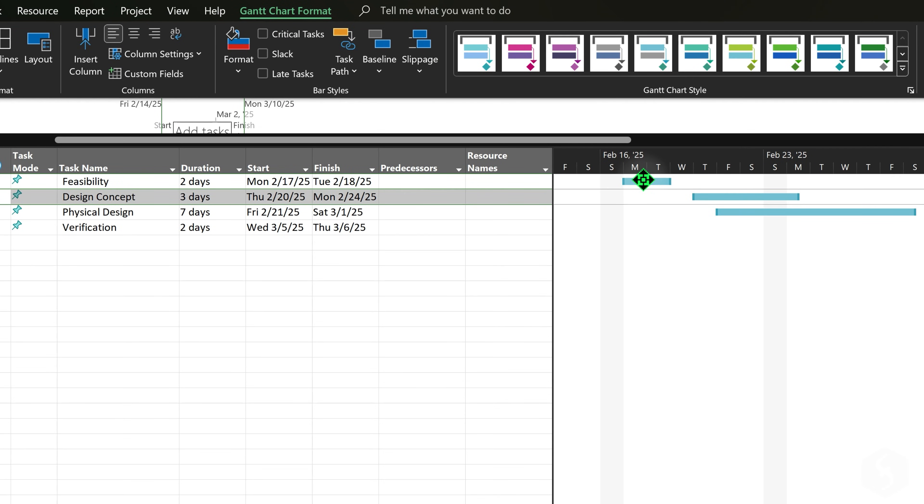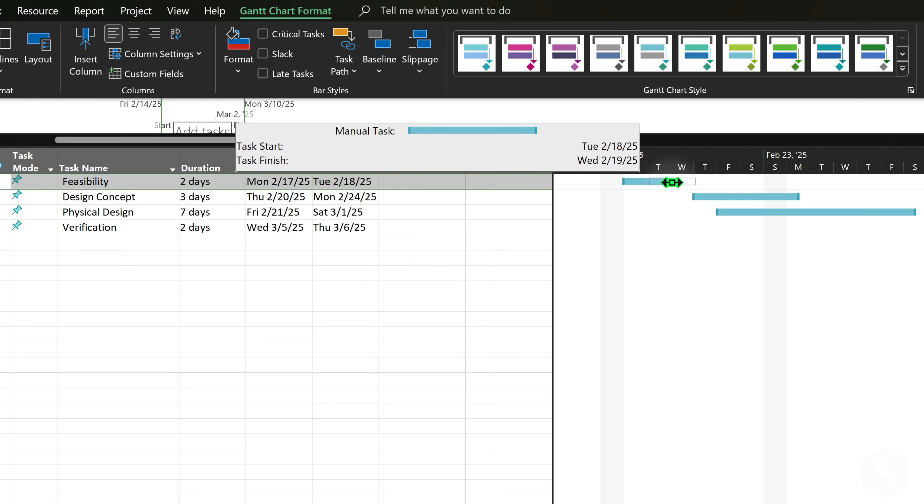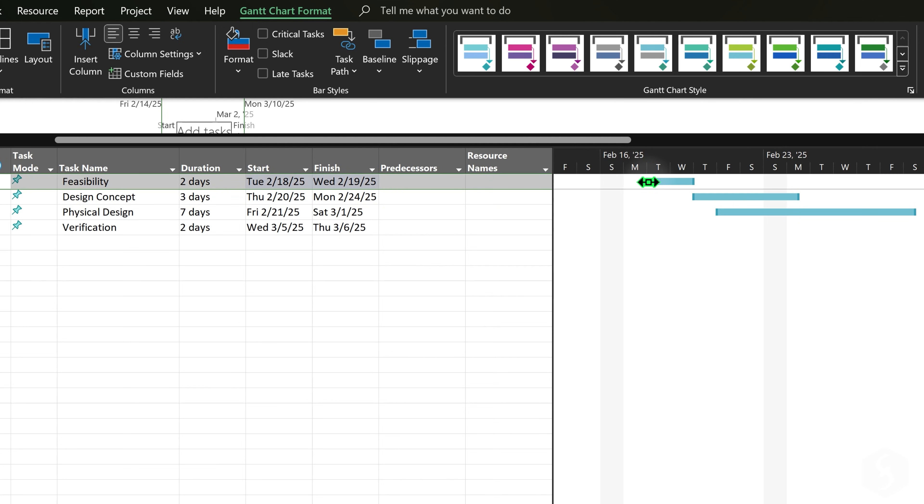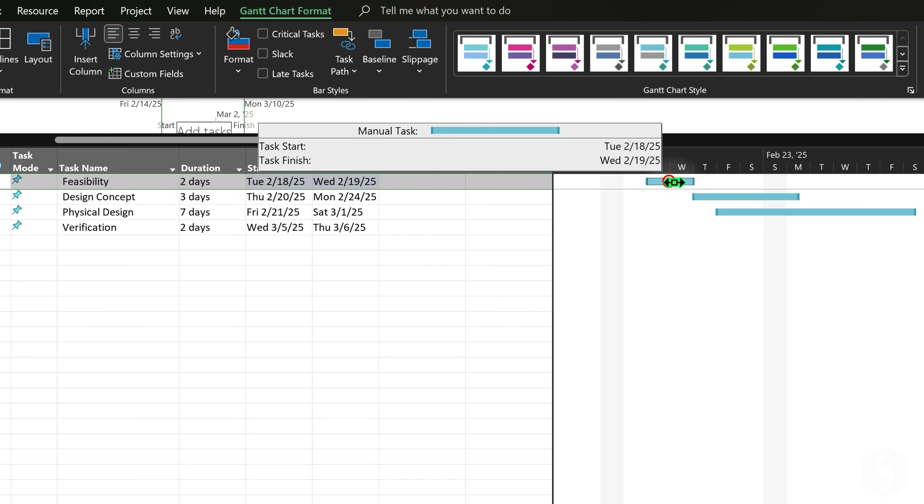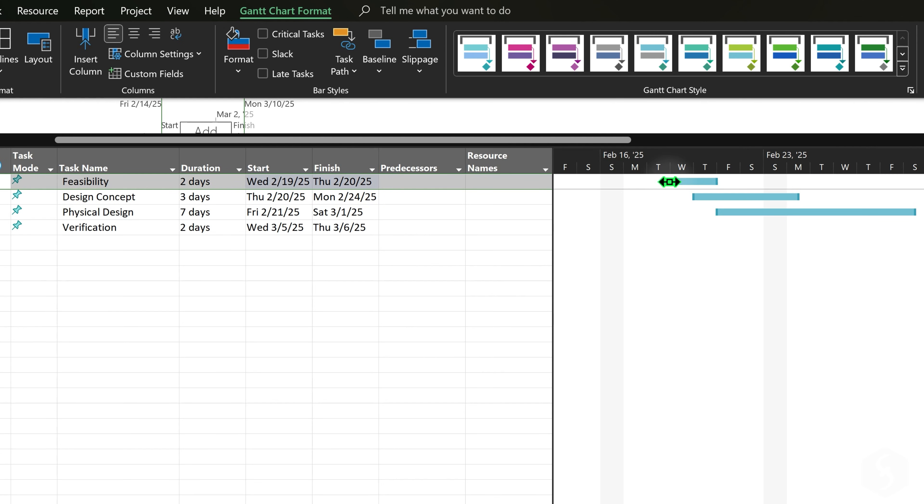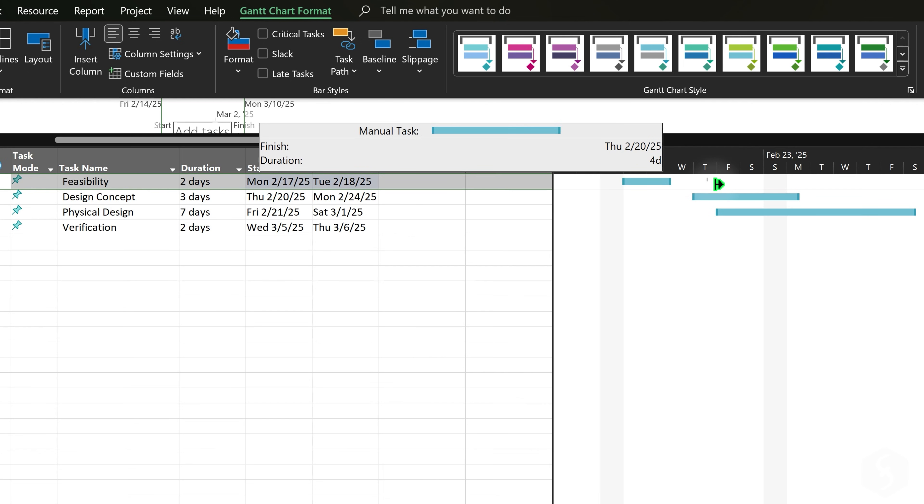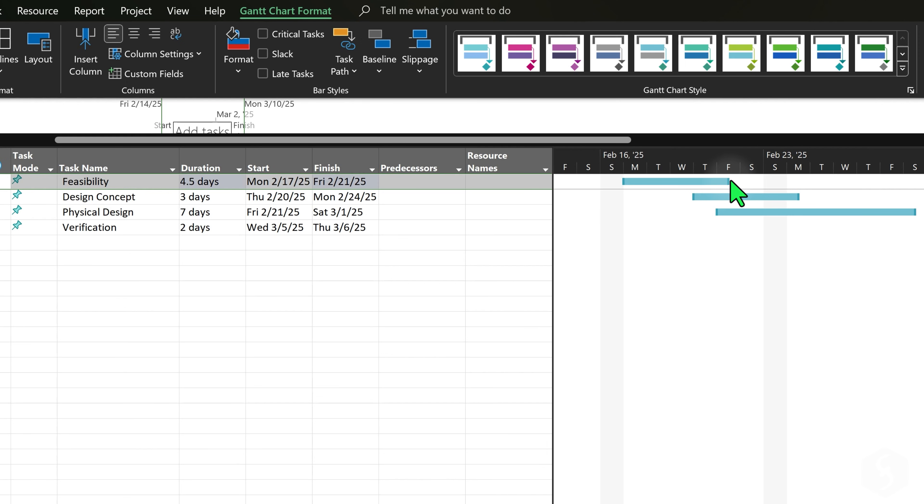Click and drag any task to move it in time on the Gantt chart, updating the start and finish dates in the task sheet. To adjust the task duration, drag the right edge of the bar and shift its finish date.